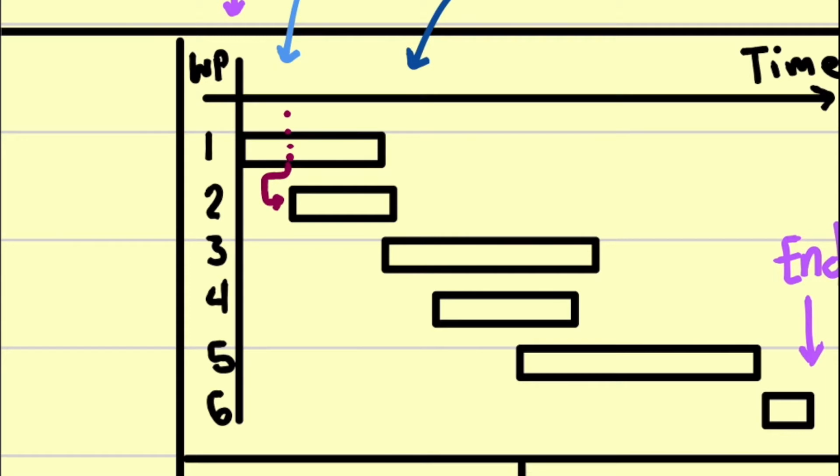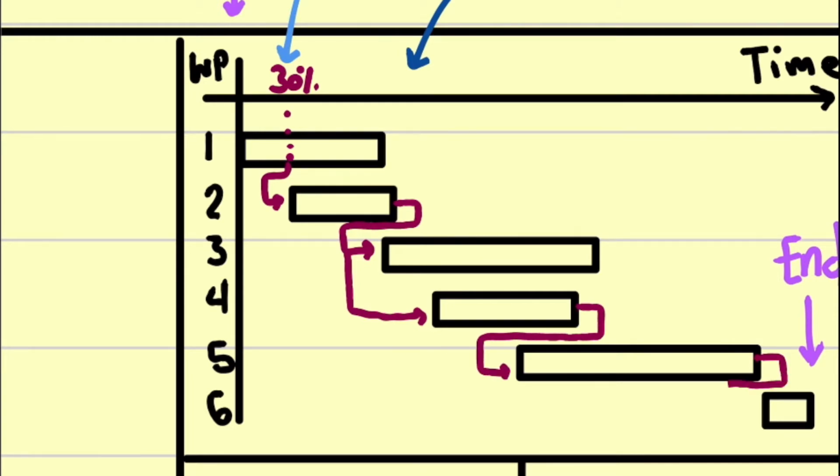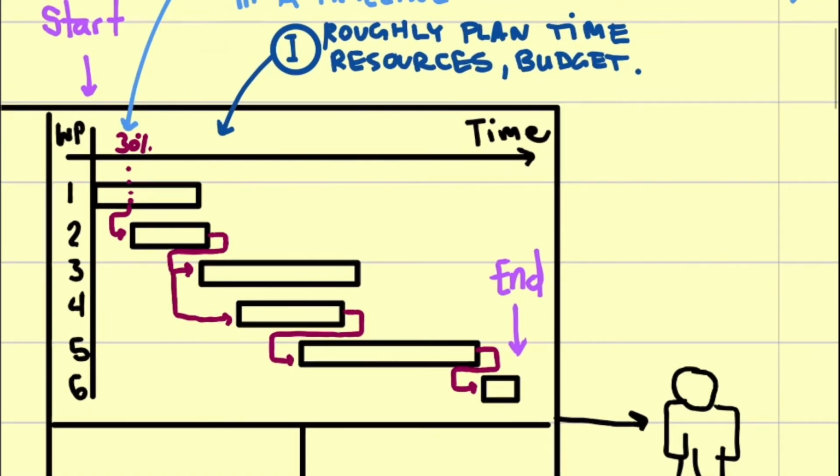When I'm done 100% with activity 2, I can start with activity 3 and with activity 4, and not before, because you need the base to build the pillars, to build the structure, or you need the walls to be able to build up the electricity, whatever. So you can put dependencies on the work packages. And this is going to be important later on for another exercise, okay?